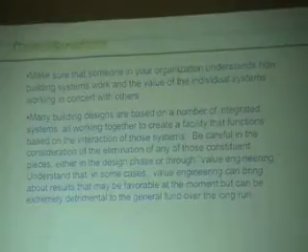Another one that I'm aware of that has happened is somebody will put in e-glass, and e-glass is sometimes so efficient you may not need air conditioning. Somewhere along the line, the contractor comes to the school board or the administration and says, you know, I can save you a little money. You've put a lot of money into e-glass. I don't think you need it. Okay, we'll take it out. And three or four years later, or maybe even the first warm spring, somebody's coming to you and saying, we've got to have air conditioning in here. So it means either passing another bond or trying to figure out how to finagle it out of your general fund.